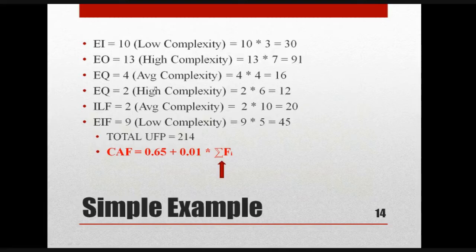So likewise, we are calculating the number of inputs multiplied with the complexity values, so that you are able to identify the weighting factors for each value.